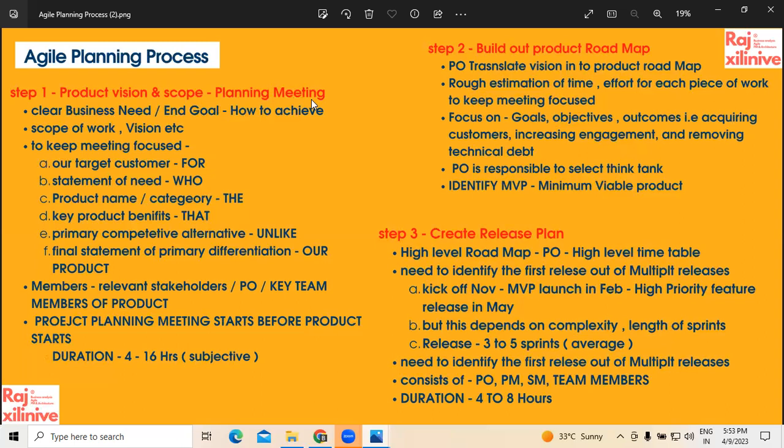Or else, in the existing sprint, let us assume that out of 5 user stories, the team could complete hardly only 4. One is balance. That one user story, either you can transfer to the next sprint or you can mention it in the backlog. And again, that refinement process can be done. Understood, Archita? Clear? Yes, please.